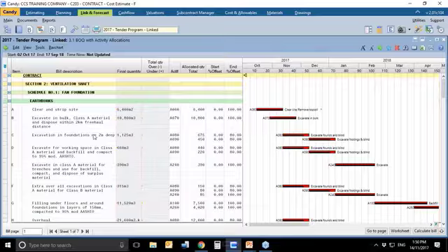Here, that's my bill with activity allocations. I've got an item, page 1, item C, excavate and foundations not exceeding 2 meter deep. The quantity is 1,125 cubic meters. And I've got resources behind it. I've got my unskilled labor, my digger loader, my excavator, everything working behind that bill item. The resources loaded against that bill item.